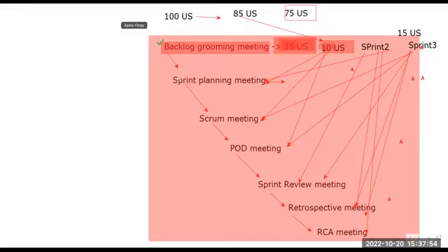What will happen in that case? We will move the task to the next sprint, but yes, we have to give the reason why it got incomplete, why we were not able to complete it. We will provide the reason: because of this problem, it got missed. You have to give the reason, right? For example, the reason is lack of process knowledge. You can highlight this problem.